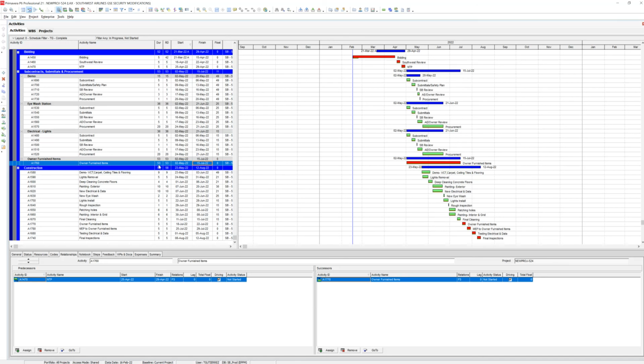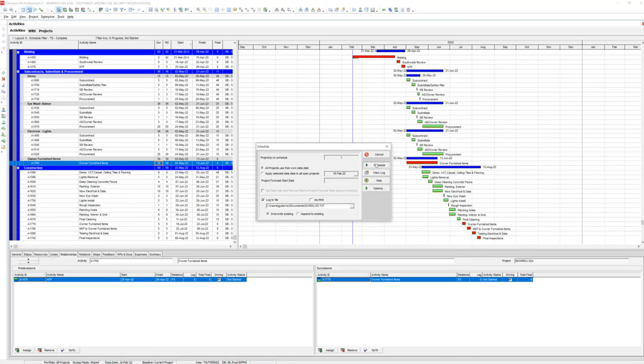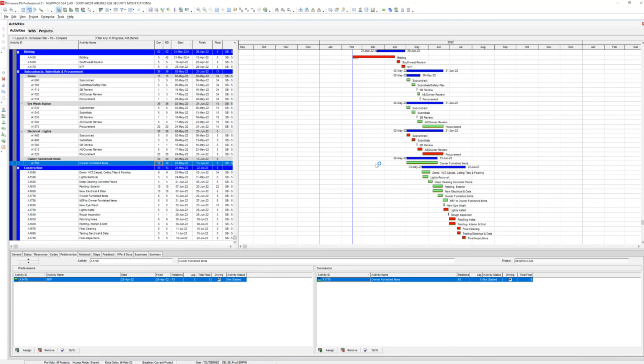So it's important to track it, at least to say, look, I always assumed I would get all your stuff in 30 days. You're taking 35 days. You already knew what I assumed in my schedule, right? Right or wrong. So we'll do 30. And I think at 30, it shouldn't be critical. Yep, there it is. So at least you can always say, you know my assumptions. They were on my schedule. I always carry 30 for you. So now you're telling me it's 80 days. I can't get my final inspections, right?